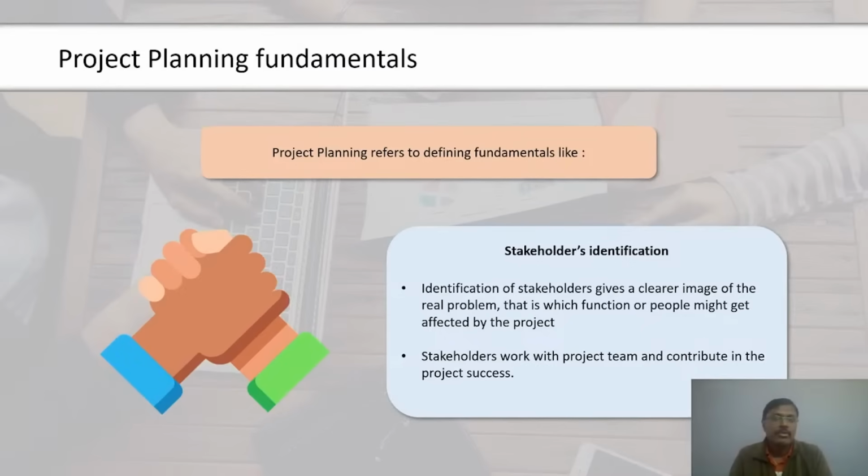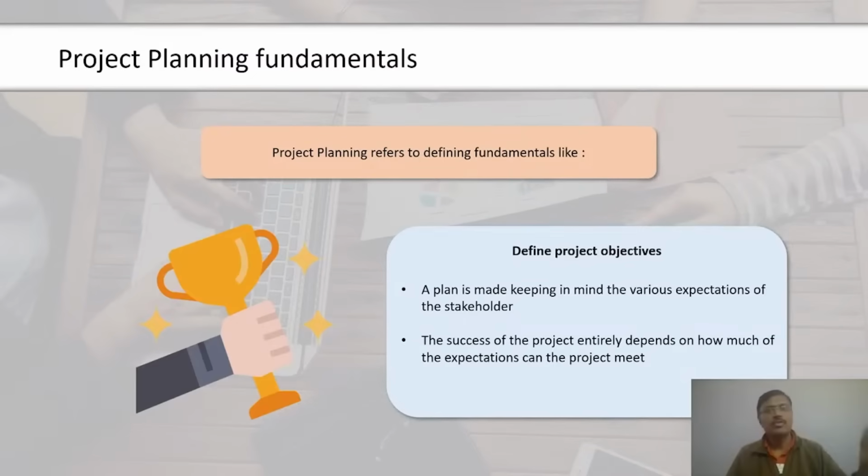So here we speak about risk. If something gets deviated, why will it deviate? Like power failure in this training I told you about. Power may fail, that is a risk. So when we run this session, if power fails or internet fails, are we ready to handle it? Yes, to some extent. Okay, power goes off. I have the UPS. I may say my laptop has the battery. But the laptop has the battery, what about the internet? Internet systems need the power. So obviously we need to have a UPS. What if the UPS fails? Can you work beyond that? I don't think so. That risk remains, but the probability of such an occurrence is very low. So that we need to analyze.